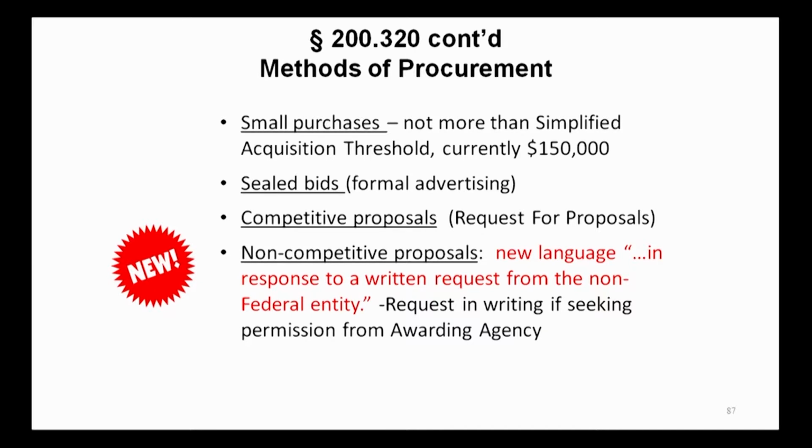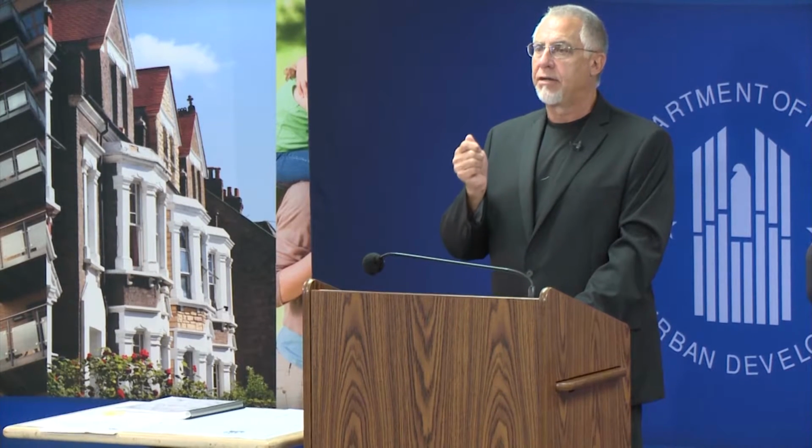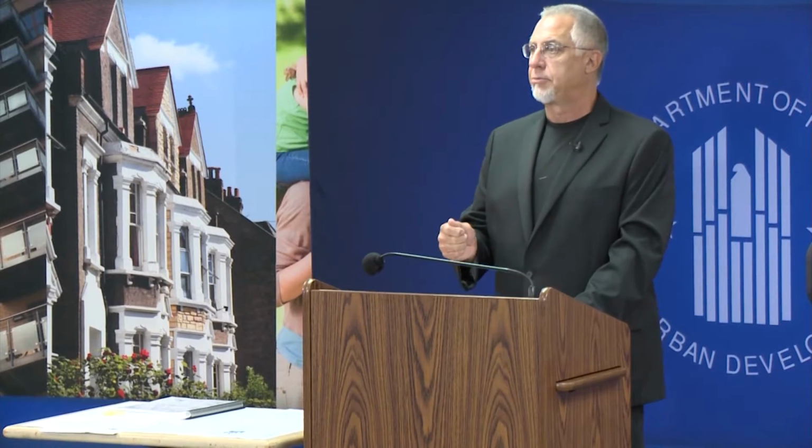Because you are specific, explicit about what's required by the contractor, the only point of making the selection is based on the price, the cost. So it's not based on low bid alone. It's the lowest bid from the responsible and responsive bidders. You identify in your procurement documents what is required for that bidder to be responsive and responsible.